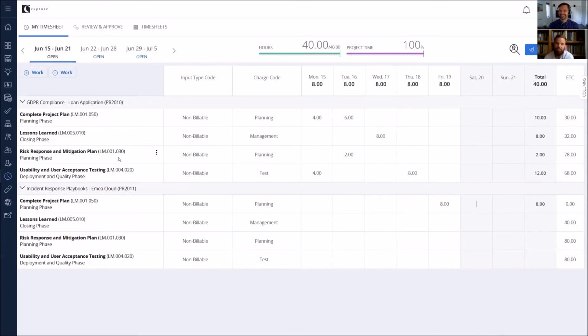And then as we mentioned, once you timesheet in here, it really aggregates into actuals. So once it gets approved, or if there is an approval process, it aggregates into the actuals where you can track your actual cost for the project, and then based on that, your actual cost for the program and portfolio. Basically the whole thing is integrated from the beginning till the end. Exactly. And I think that's important.